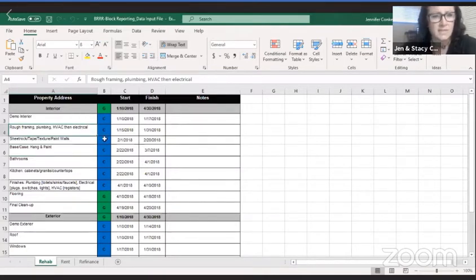Now, during this rehab process, there's two things that you could also use this tool for. First, you're using it for your contractor and you want to meet weekly and talk about how are we progressing to these agreed upon timelines, so you keep that project in motion and on task. Anytime you're approaching where it's not a green or it's not a blue completion and it's starting to approach that yellow, that's when you really want to kick the flame up and say, we really need to make sure we're moving progress here on this area. When do you think it's going to get done? And really try to burn all your calories on making sure that the deadlines are being met, or else you get your project off track. And again, the more projects you have, the harder it becomes to keep track of that.